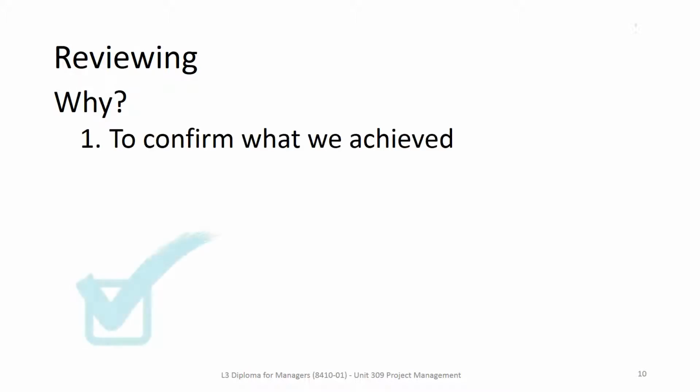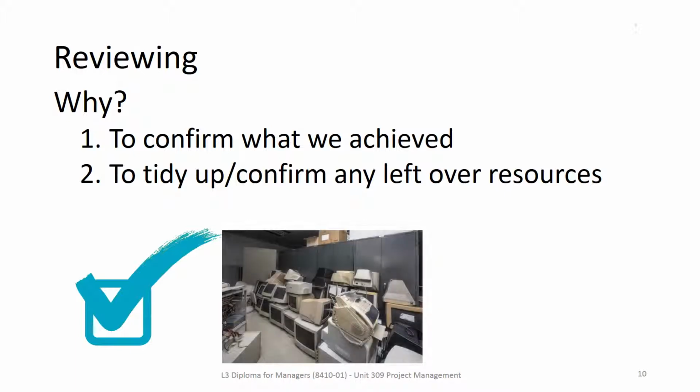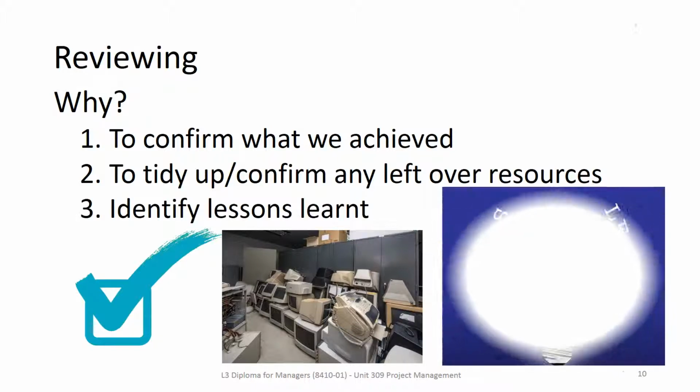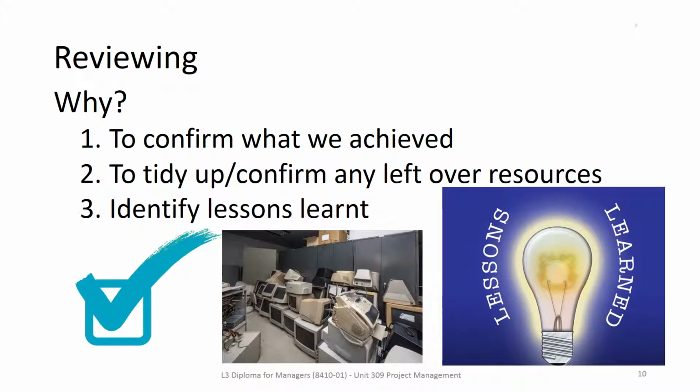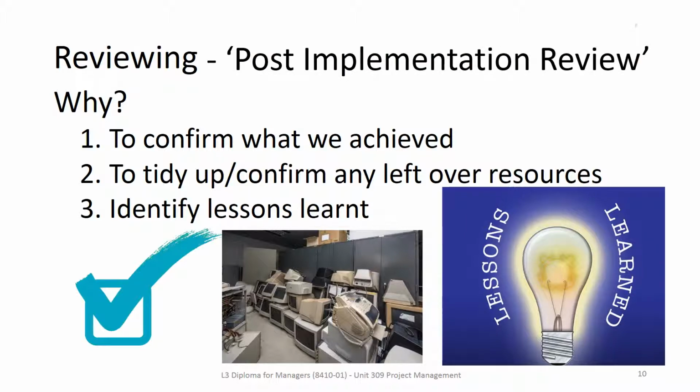Because, one, we need to confirm what has been achieved from a team perspective and from a project perspective, because the team may have performed well, it might have just been the project has collapsed. Two, we need to tidy up and confirm any leftover resources, so that's a bit about reallocation, reuse, recycling, and just generally cleaning up. And then three, we need to identify any lessons learned, good and not so good practices that can be identified and analysed, so improvements can be made for the process or for the benefit of any future projects. So overall, it's probably one of the most important stages of the project lifecycle in total, and often referred to as the post-implementation review.